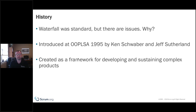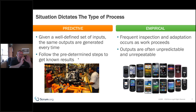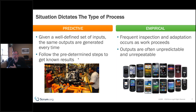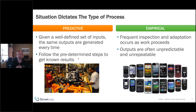What came out of that is a framework for developing and sustaining complex products. If we have a very predictive process where everything happens the same way every time, we probably don't need Scrum. But if we're building applications or phones — things that require constant and frequent inspection and adaptation, constant changing — we need to continually learn empirically. This is where Scrum can be very well applied in those complex worlds.